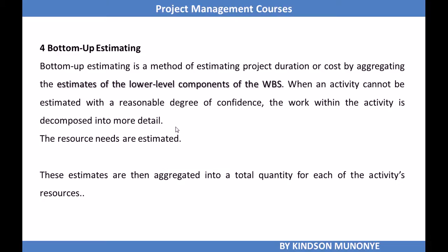So if you have an activity and you want to estimate the resources needed for it, and the degree of accuracy or confidence level you are getting is not considerable, you might have to break down this activity into two or more activities to enable you to make more accurate estimates.